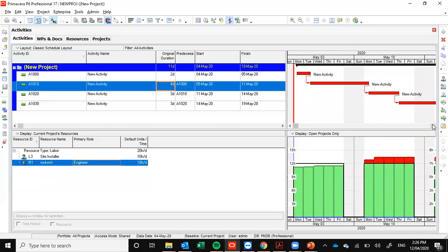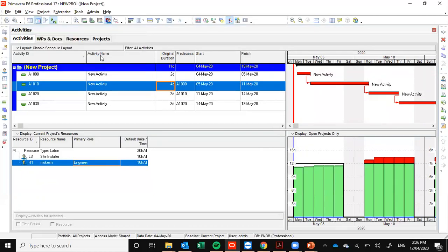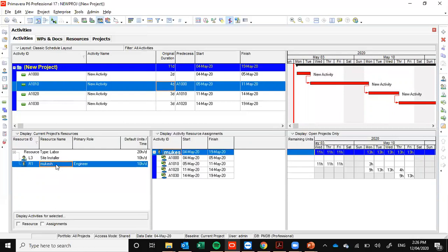So something you can do, but it's very much typical for multiple sets of resources. For single resources, we can do it easily, but we have to go through all the resources step by step to manage the leveling. And on the basis of that we are getting a finalized duration, because in such an environment where we have a lack of resources, definitely we have to increase the time. In such a situation when we have under allocated resources, definitely we can decrease the time to increase the resource availability, or we can say resource utilization, to work properly. It will impact on your project performance.